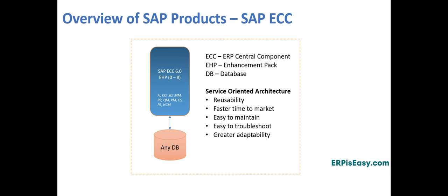Chapter 5, what happens in an SAP project? SAP projects are typically complex, with implementation times ranging from a few months to a few years, depending on the number of solutions implemented and the organization's complexity. SAP projects typically go through 6 stages. They are project preparation, blueprint, implementation, testing, go live, and support.